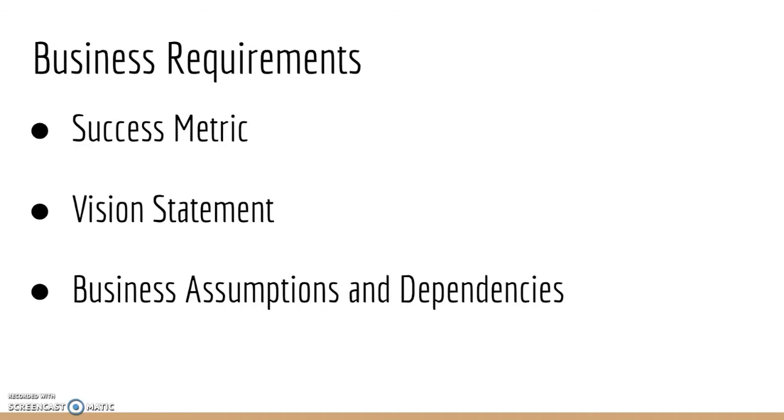And what that means is after the automated processes have been in place, they will be accepted more because people will understand how to use them. And by people, I mean Shelly. She'll understand the gist of it, how to enter data correctly, and utilize the automation process without issue. And SM3, within 6 months of the initial release, there will be a 90% reduction of manual data entry. The automated process will enter data for her, and manual input of data will just go down drastically.